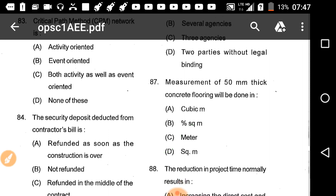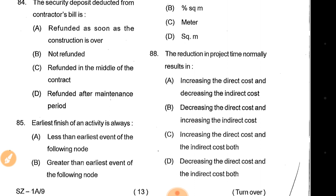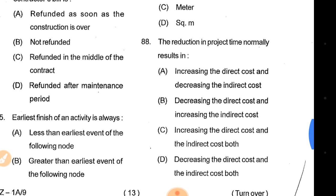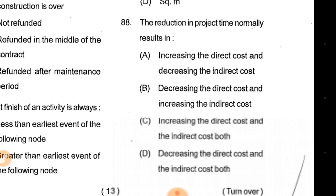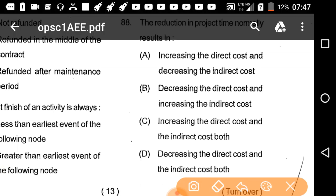Question 88: The reduction in a project duration normally results in increasing the direct cost and decreasing the indirect cost. Option A is the correct answer.